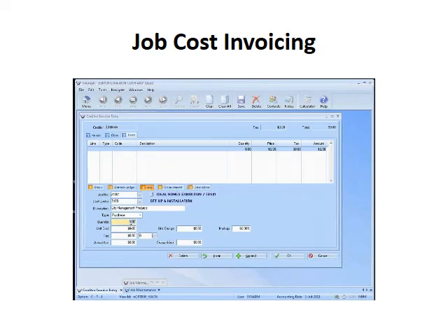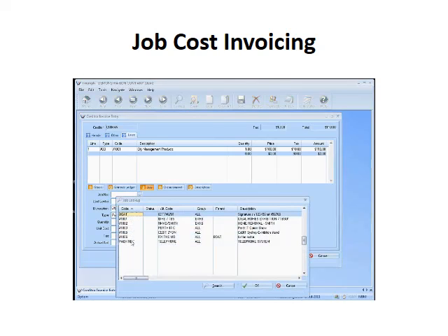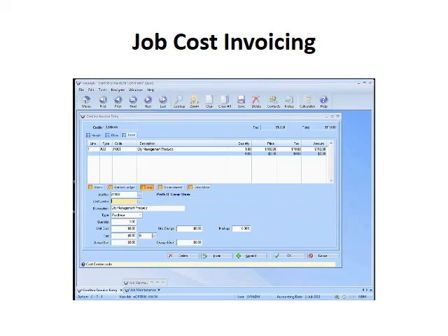Quantity, you put in the quantity that you're buying, what's the cost price, it adds GST. You'll see it automatically works out what your charge is based on the markup that's set within that job and cost center. You can override that and put your own markup in, or put in your own rate. It brings through the tax, puts in the actual amount, and gives you a grand total of the charge. And you can do multiple lines to different jobs and cost centers quite happily.